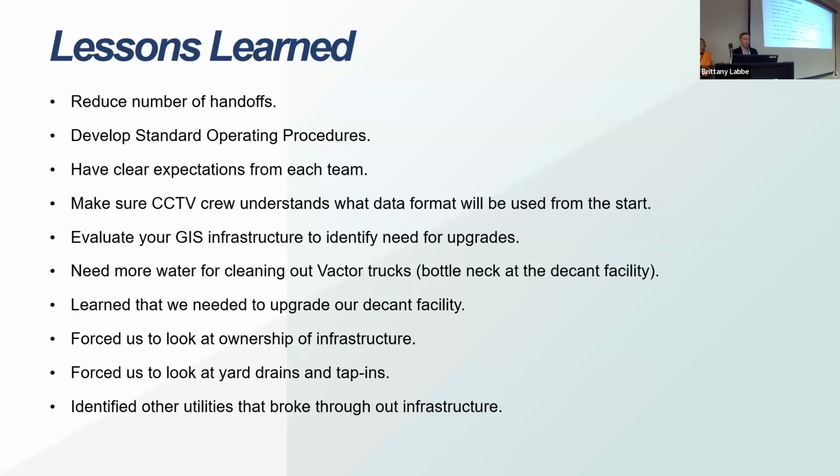So this forced us to actually look at who owns what. Are there easements also? Because we found a lot of our MS4 is running across private property with no easement on it. So all those things came out of this program, and now we can fix those and move forward and make the program run better in perpetuity.